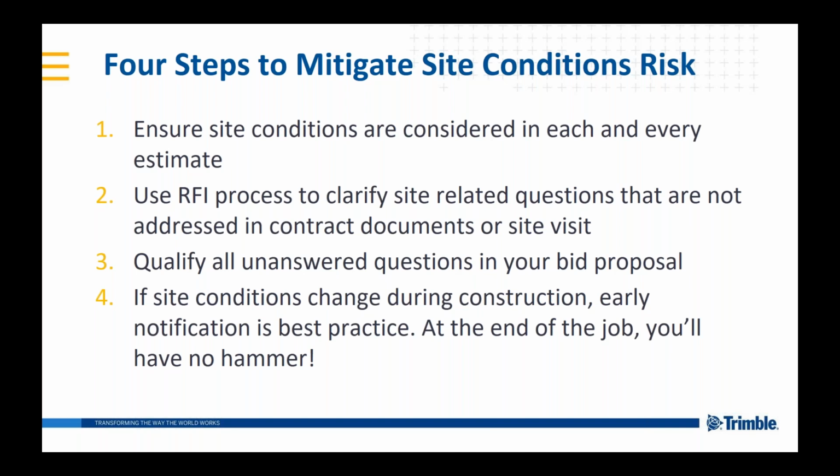Qualify all of your unanswered questions in your bid proposal and make sure that those are called out. And I will tell you that I've heard contractors say, you know what, I can't put any of that in my bid proposal. Well, my experience is this: for most projects, if you're the low bidder, you'll get to the table to talk and you can clarify what you might have put in those clarifications in your proposal. So just sticking your head in the sand and not putting it in your letter is risk that you're taking on. So I would suggest that you always put those types of unanswered questions in your proposal and document that.